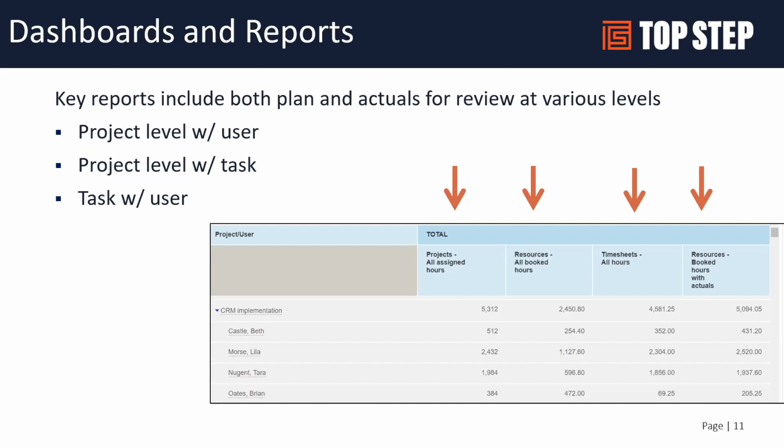And so if your scheduling is accurate, you've got a good view of the workload moving forward in the bookings module, and people are putting in timely time, this can be very powerful. It can get to that estimate at complete calculation using time and bookings. So this is another option to look at the future and determine where I'm going to land, and then start to make adjustments if you think you're going to be off. This particular report is focused on customer and project and user. You could also add task. You could add task and user and project. So you can slice and dice this data.